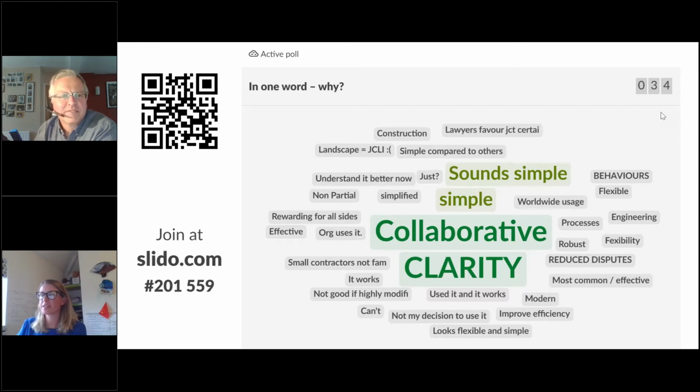What is it that's so good in NEC that you don't have in FIDIC contract? Oh, dear me. Can I send you a link to my 1.5-hour webinar on NEC compared with FIDIC? I'll put that in the follow-up to the course. NEC is just clearer, better structured. So, for example, under FIDIC, for some events the contractor can claim time only, sometimes time and cost, sometimes time and cost and profit. The various places in the contract where you can make a claim are all over the flipping contract. In NEC, the compensation events are in one place and you get the same mechanism for time and cost for all of them. It's just straightforward and easy to use.